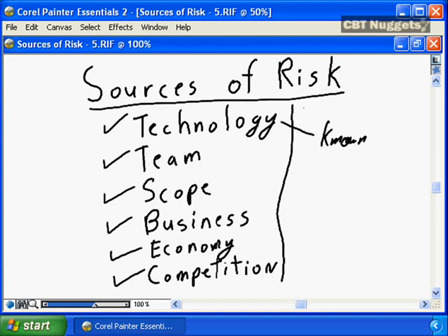So we identified 3 risks associated with technology: server, inappropriate technology, bandwidth. Are there other unknown risks associated with technology? And chances are yes. You do not have time during project planning, you do not have the knowledge during project planning to identify all risks associated with technology, so there's always going to be unknown risks. And again, you need to allocate the time, the dollars to deal with both the known risks